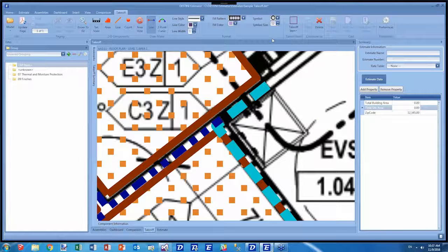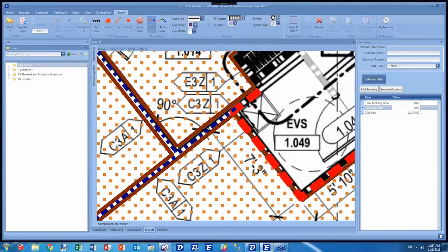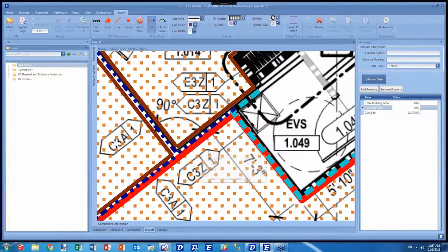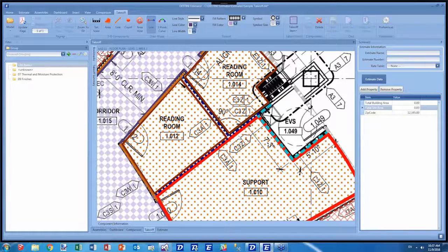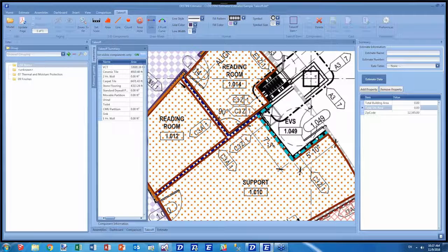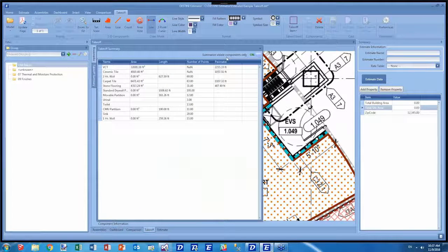Okay, and then we might need some clarifying on this one, but can you combine like item takeoffs, i.e. carpet tile, from different drawing sheets and tie them to the same line item in the estimate cumulative quantity? So I believe I know what you're asking. There's a couple different ways you can handle this. I will say, though, this is one piece of functionality that is just being sort of tidied up now, otherwise I would have showed it. Traditionally, we do that through the takeoff summary. We have this concept of the takeoff summary that will show you either everything that's visible only, or I can slide this off, and then it'll show me everything that's in all of my drawings.